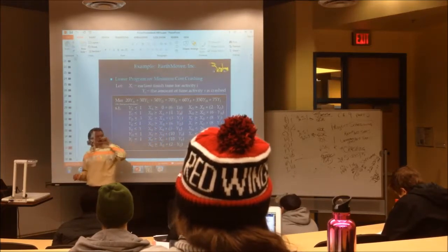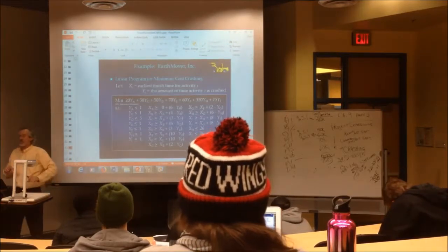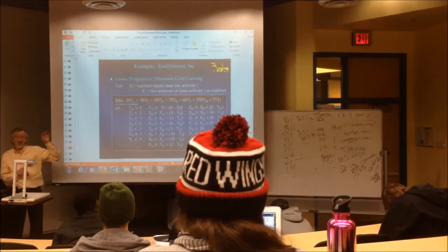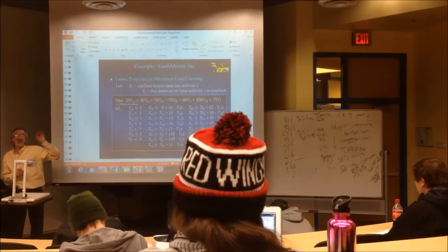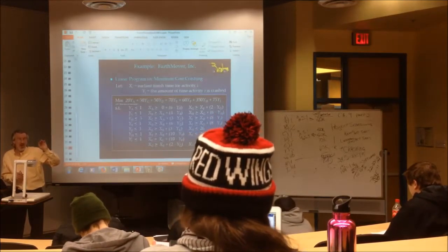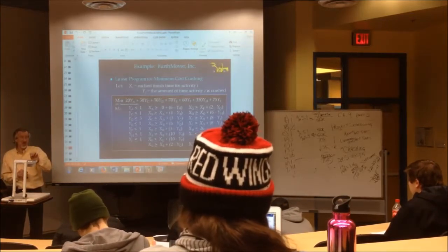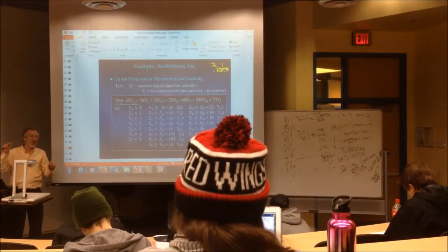Those are the words that will help you decide what goes in every spot. I'm going to say the words again. The x variable for the activity you're writing it for is greater than or equal to the x variable for the activity that precedes it, plus the normal time of the activity you're writing this for, minus the y variable for the activity you're writing this for.